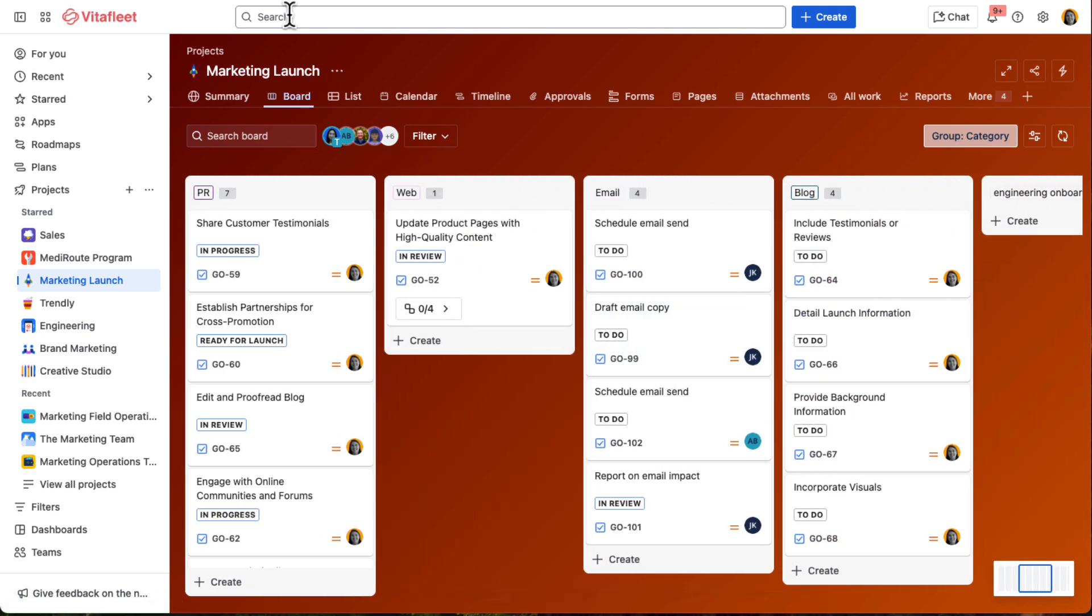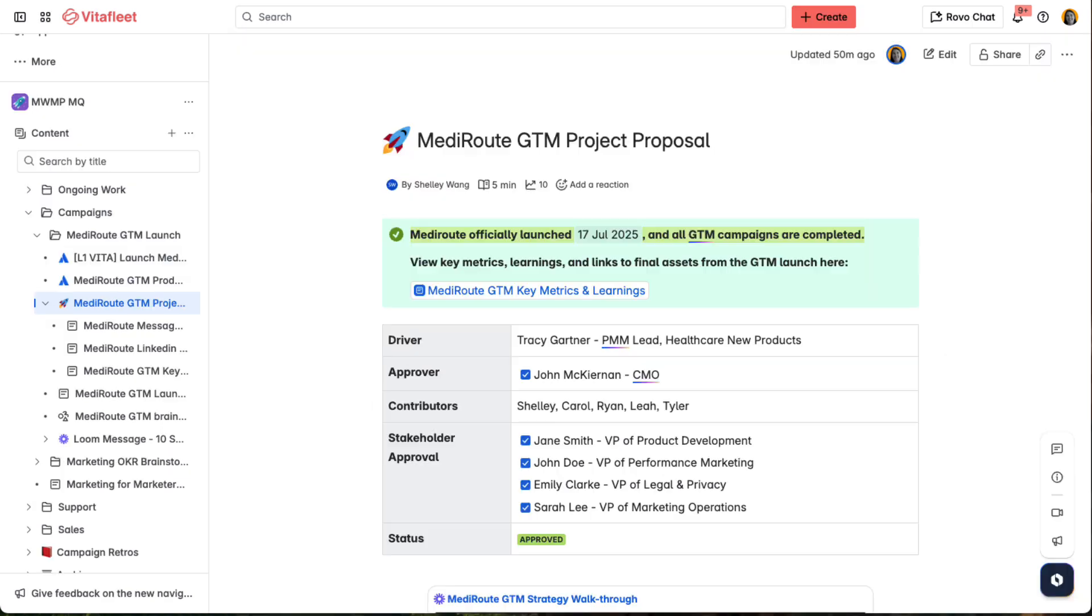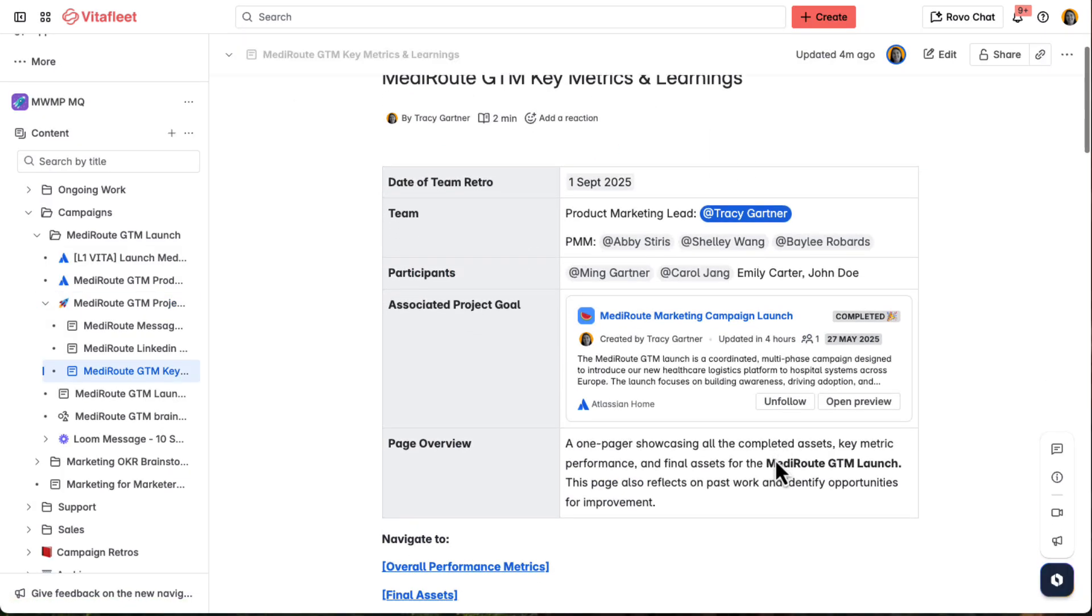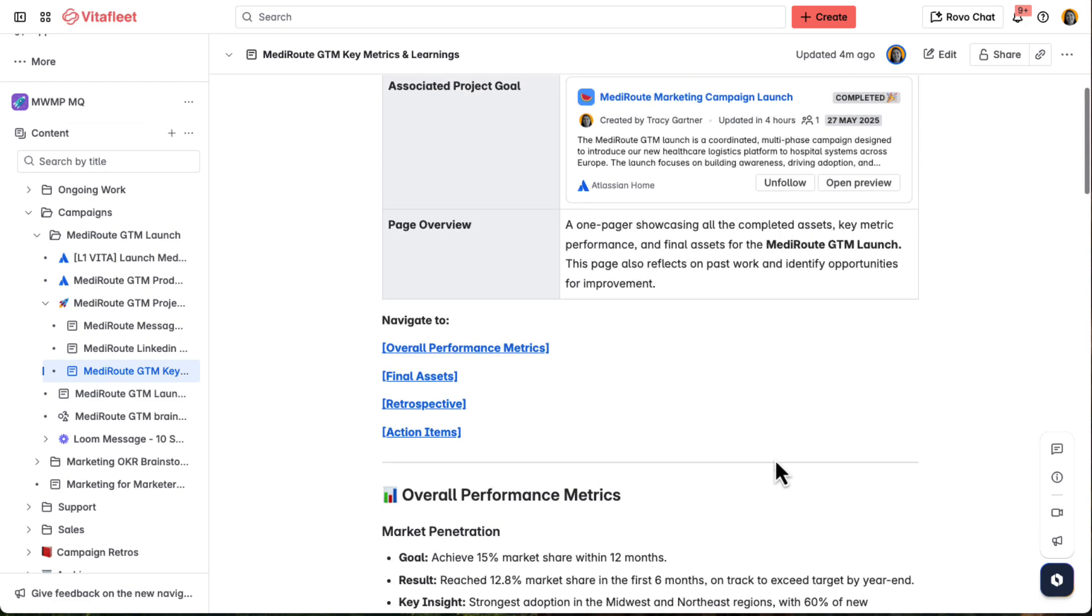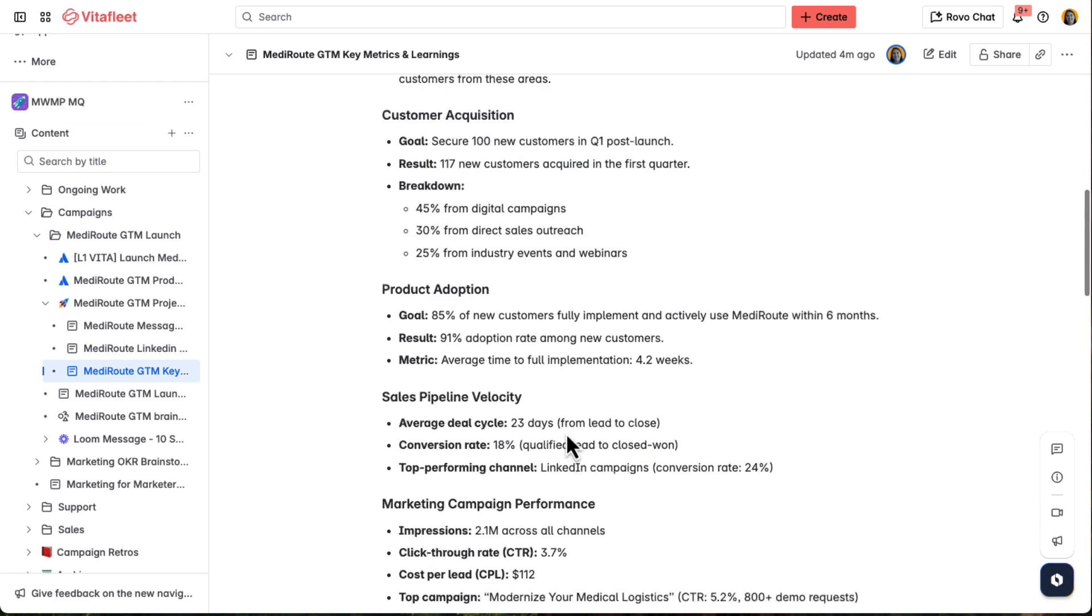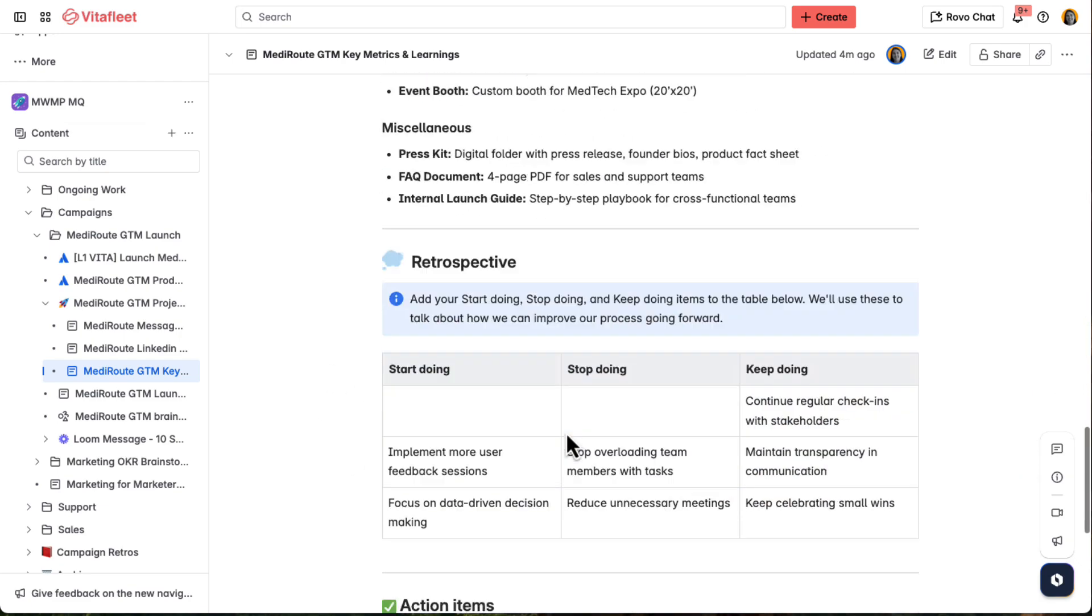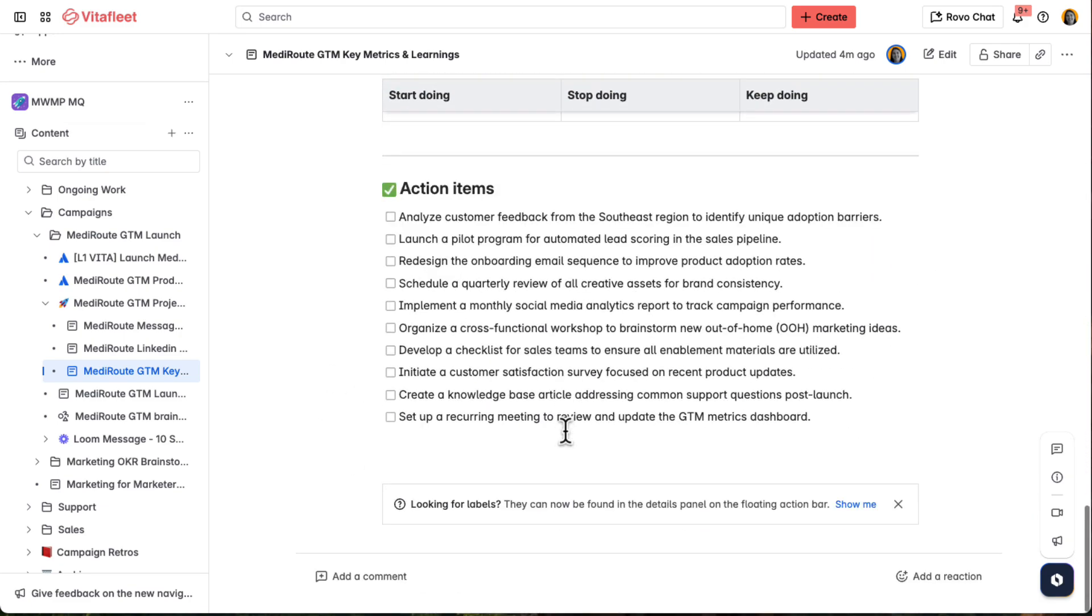After MediRoot goes live, Tracy updates the original GTM page in Confluence with key metrics, learnings, and links to final assets, giving the team a complete retrospective that they can use to inform future launches.